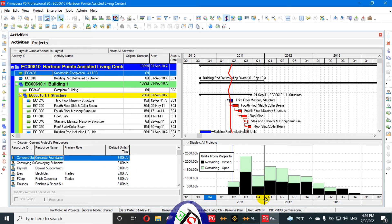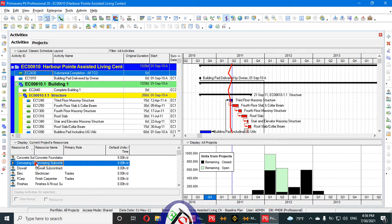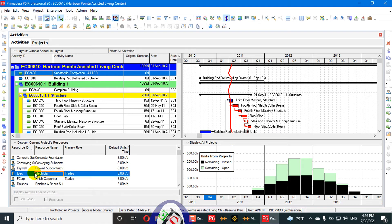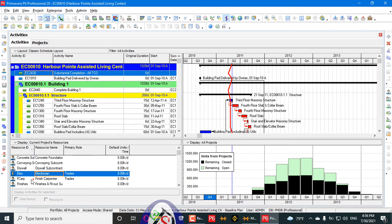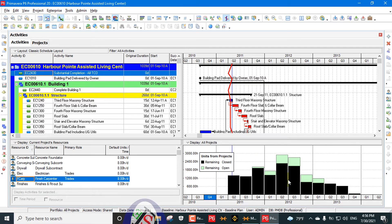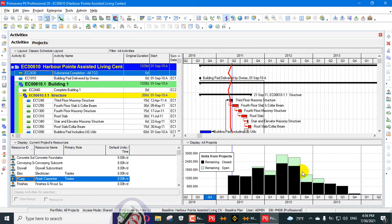You can clearly see all project resources — those assigned to other projects are now visible here. The black bars represent closed projects and the white bars represent open project resources.